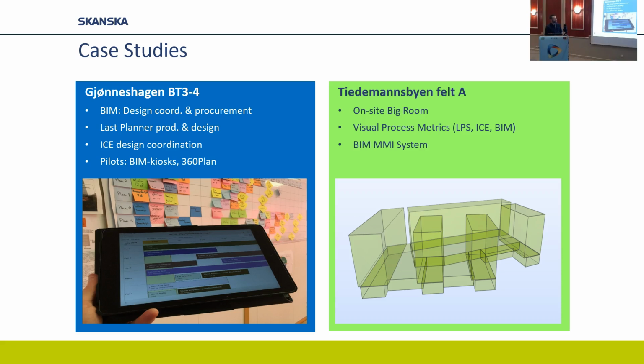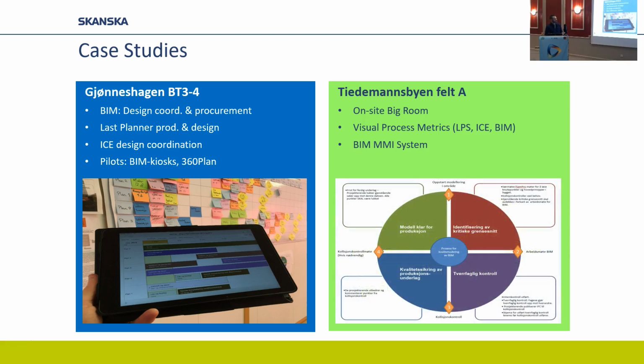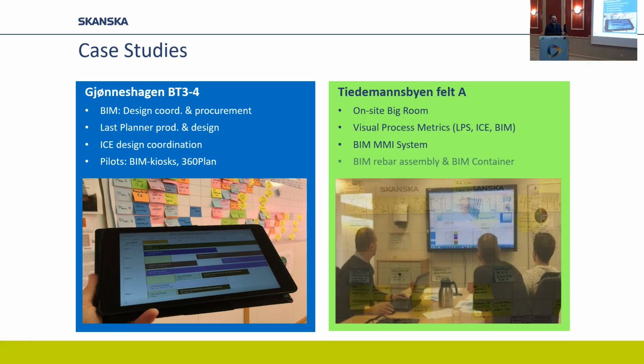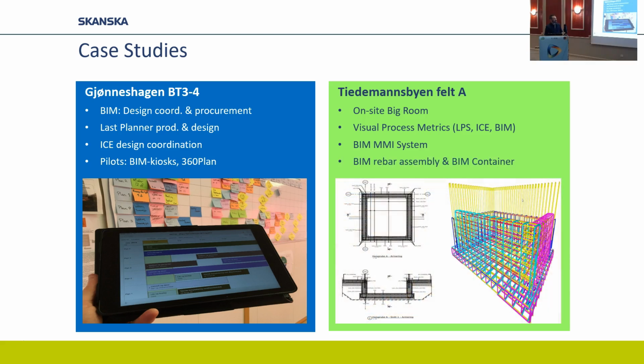Model Maturity Index means the same thing as LOD, but it's very focused. We bring every location of the model through a maturity wheel, and we plan it as part of the last planner. But this has been my motivation for doing last planner design processes all along, to get the model planned. Then we build straight from the model, as many of you saw on Monday.